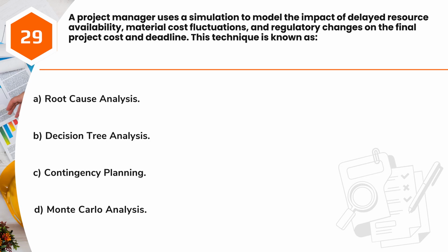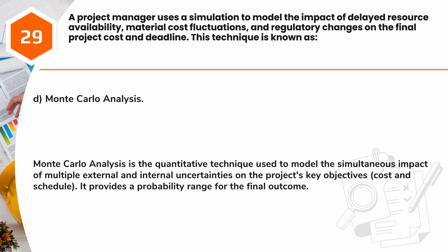Question 29. A project manager uses a simulation to model the impact of delayed resource availability, material cost fluctuations, and regulatory changes on the final project cost and deadline. This technique is known as A. Root cause analysis. B. Decision tree analysis. C. Contingency planning. D. Monte Carlo analysis. Answer D. Monte Carlo analysis. Monte Carlo analysis is the quantitative technique used to model the simultaneous impact of multiple external and internal uncertainties on the project's key objectives, cost and schedule. It provides a probability range for the final outcome.